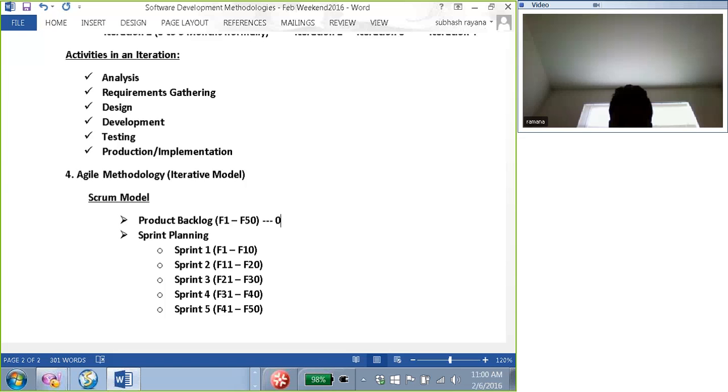It's not required because the planning is purely based on the priorities. As part of the first sprint, we said we'll implement 1 to 10. Now, who decides that? This is decided by the business. Because Agile is all about identifying the topmost important item and implementing it. So the business will prioritize out of these 50. They'll give the prioritization, and you go ahead and allocate them.